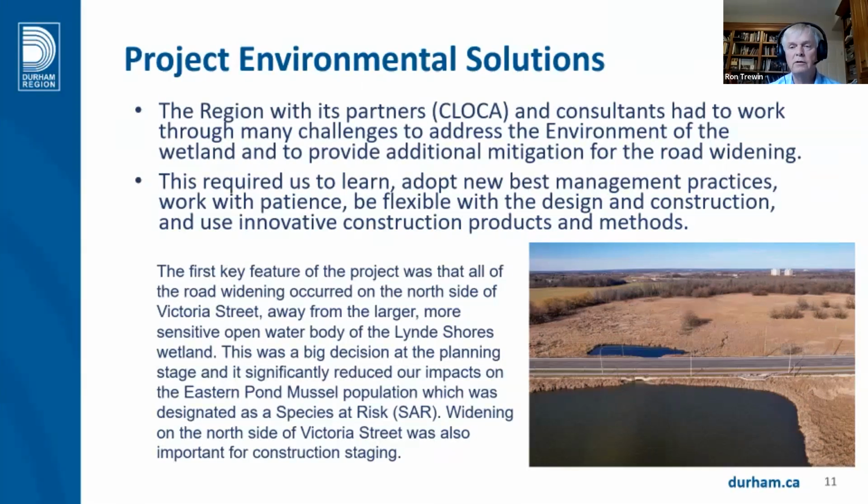Moving the widening, moving the road entirely to the north side, as you see here, away from the open water, was one of the major decisions made during the environmental assessment that was really important. This was a really big decision. This especially became true as the eastern pond mussel became a species at risk following the environmental assessment, during the design period, so it became more critical.